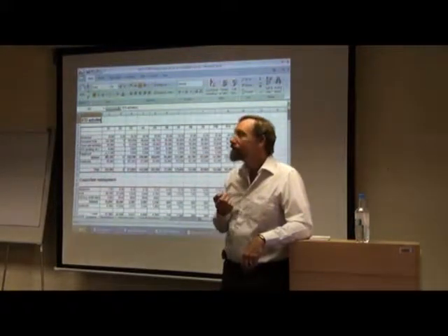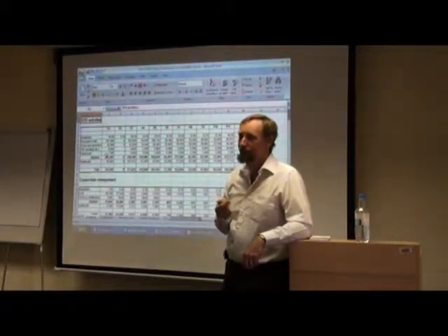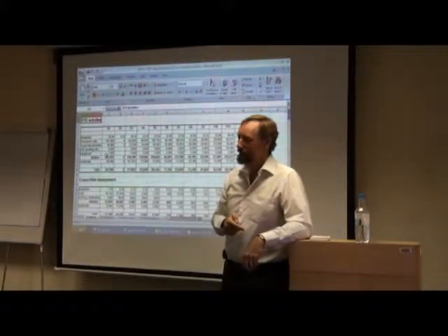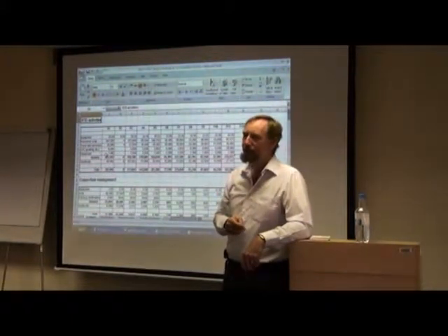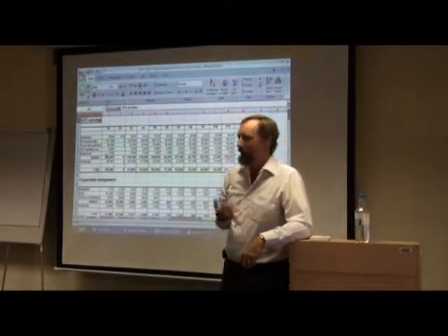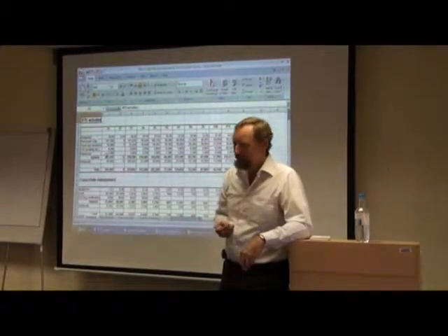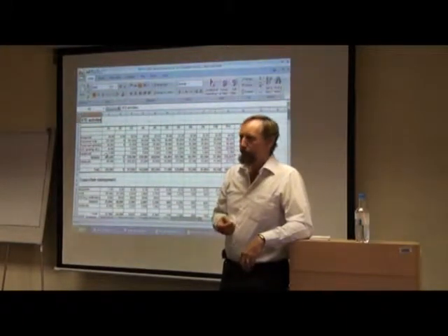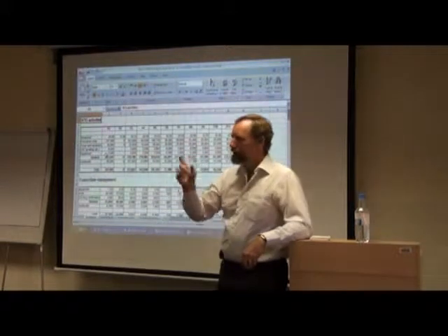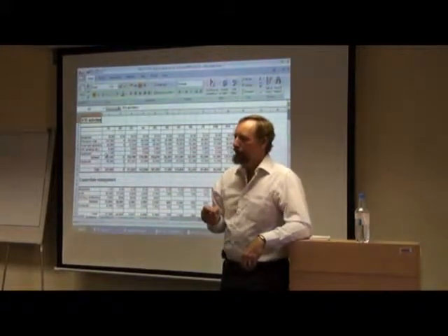From the European Commission. Because remember, you have to spread the cost over the 3 years. You're not paying for it all up front in the 1st year. It's spread over until it's fully depreciated in the 3rd year. Yeah. That is general accounting. Although you're buying it cash, when you account there, it's... okay. Indeed. So also the subsidies will come in year 2 and 3 in your example.